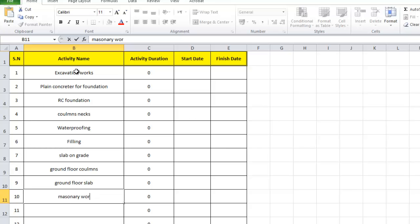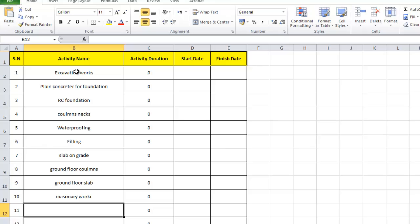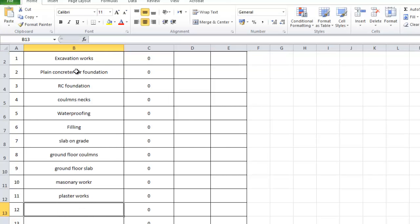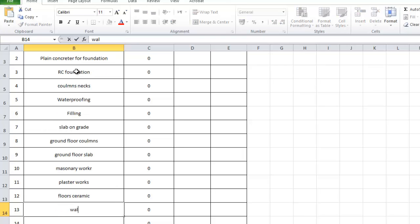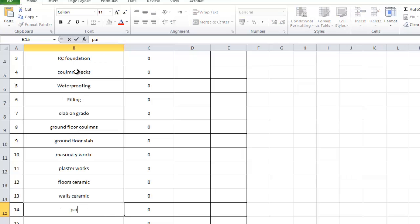Since it's a one-floor project, after the ground floor slab we have masonry work, then plaster work, then floor ceramic tiles, wall ceramic tiles, and finally painting works.